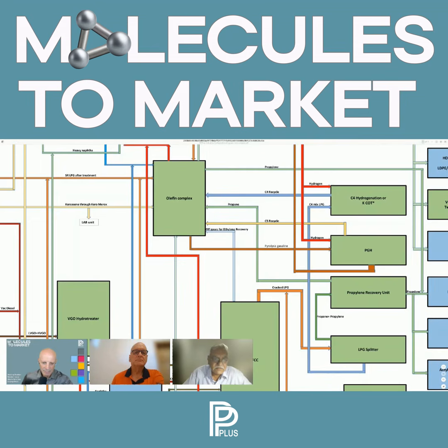Based on this, we put it together and sum up all these costs and then add to that many other things. For instance, there will be a technology fee, there will be a consultant's fee, then there will be interest during construction, there will be indirect taxation, there will be shipping costs depending upon what is the foreign component and domestic component, what would be the internal taxation.